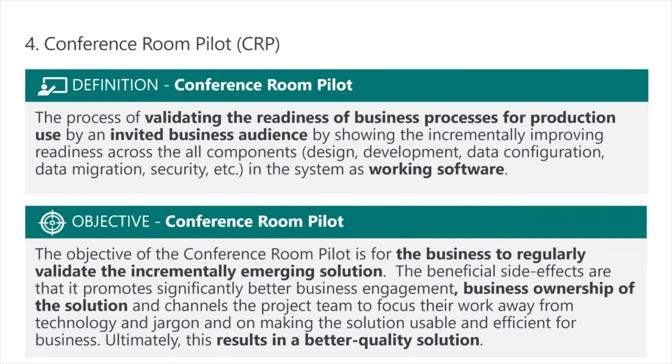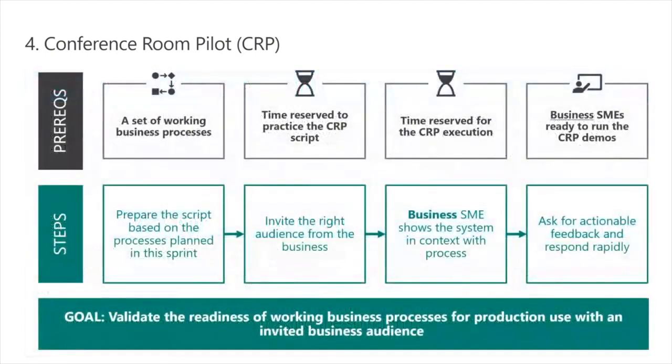And the recommendation is that you have this defined and delivered by the business SMEs that are on the project. So this show and tell, this conference room pilot, is not being shown by the functional lead from the implementation partner. It is actually being shown in working software by the business SME.